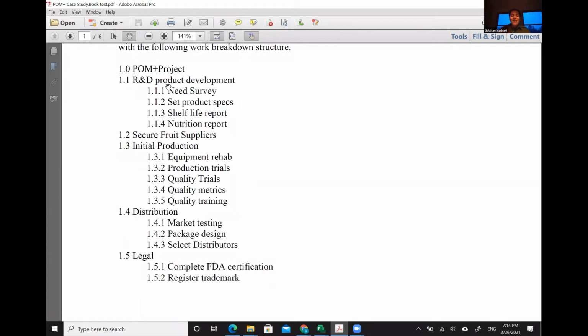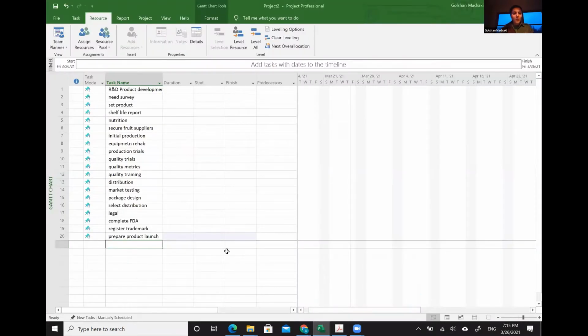So remember, one of the techniques that project managers use in order to show the WBS in the format of a list is to use the coding, and this coding could be as simple as this indented 1.1 whatever. So don't worry about it. All of this can be done automatically, but let's do the indent first.